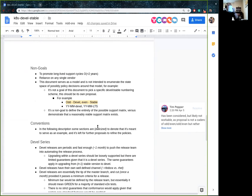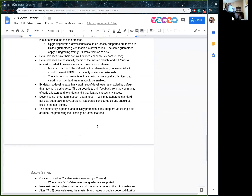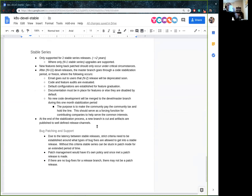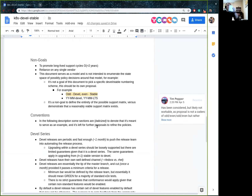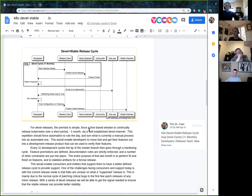There's not a lot of extra information beyond what was discussed last time — it just has more detail. I'll pause to see if there are questions. One question: do you have a vision for what would happen to features that didn't meet the criteria? Like, would the release get delayed or would they get kicked out somehow? They'd get kicked out. You have 12 months to plan a release, and if you can't determine whether a feature is ready in that cycle, it gets kicked out.